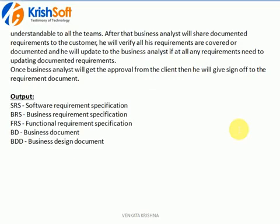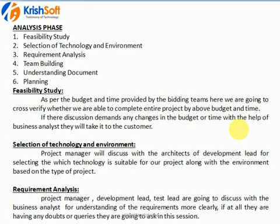The next phase is the analysis phase. Here we discuss the feasibility study: is the budget given by the bidding team feasible to develop, test, and deliver the application to the customer? What are the challenges? Are we able to complete this project on time? If it is going to take more time or more budget, management will immediately update the customer about those challenges.